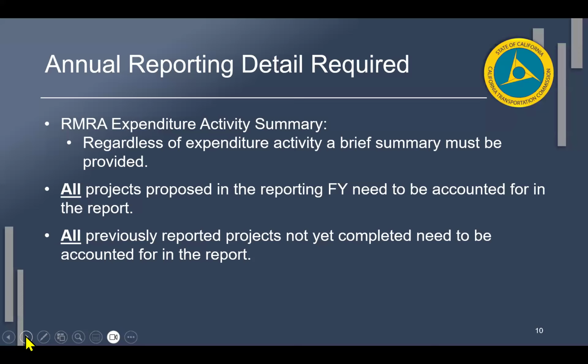The activity summary. Where I said you're going to explain your intent, this is a great place for you to do it. The RMRA expenditure activity summary, regardless of your expenditure activity, needs to be a brief summary. A lot of times we like to use it as a guide as we're reviewing your reports. If you didn't have any activity that year, no funds were spent, and you're just updating project schedules and scopes, things of that nature, give us a brief description as to why that occurred and what we can expect in the coming year.